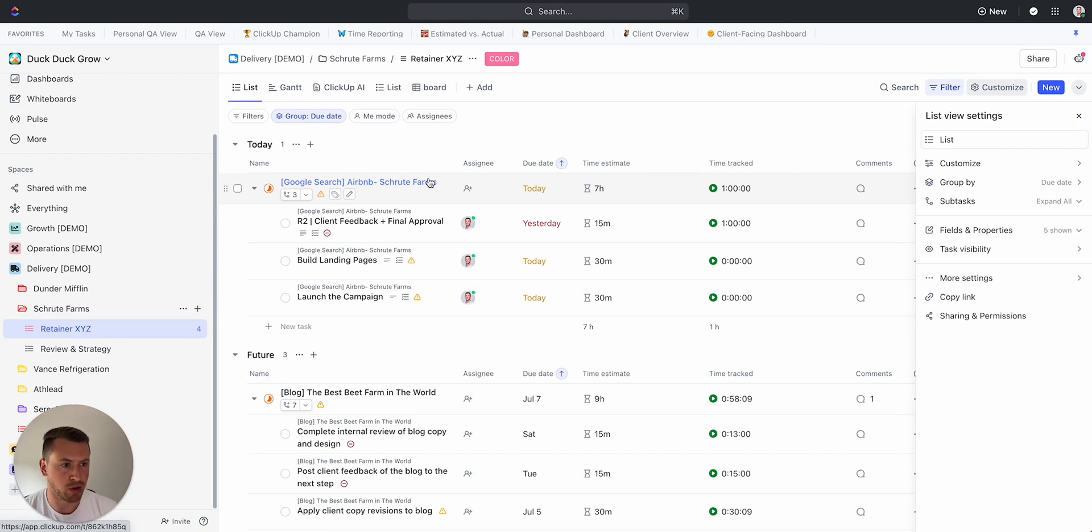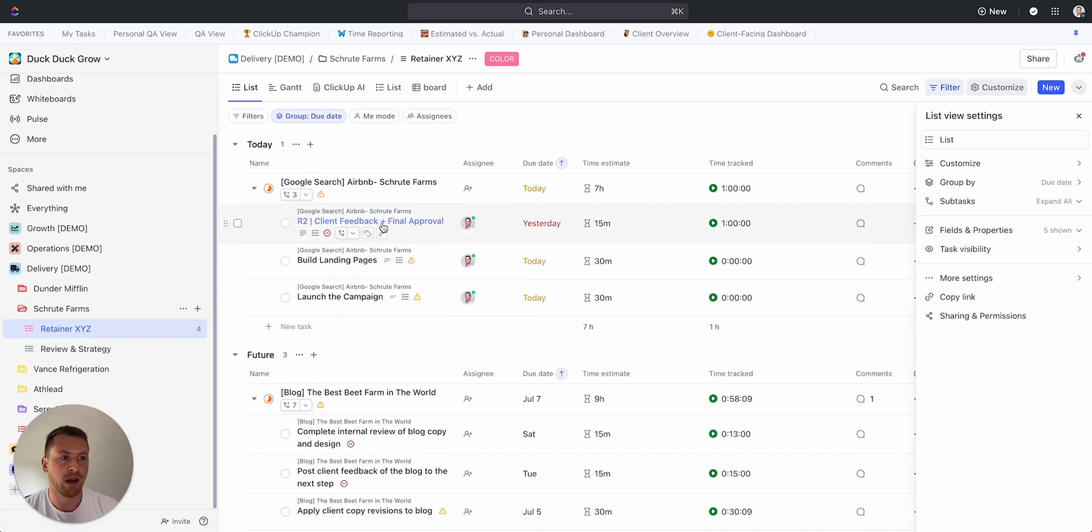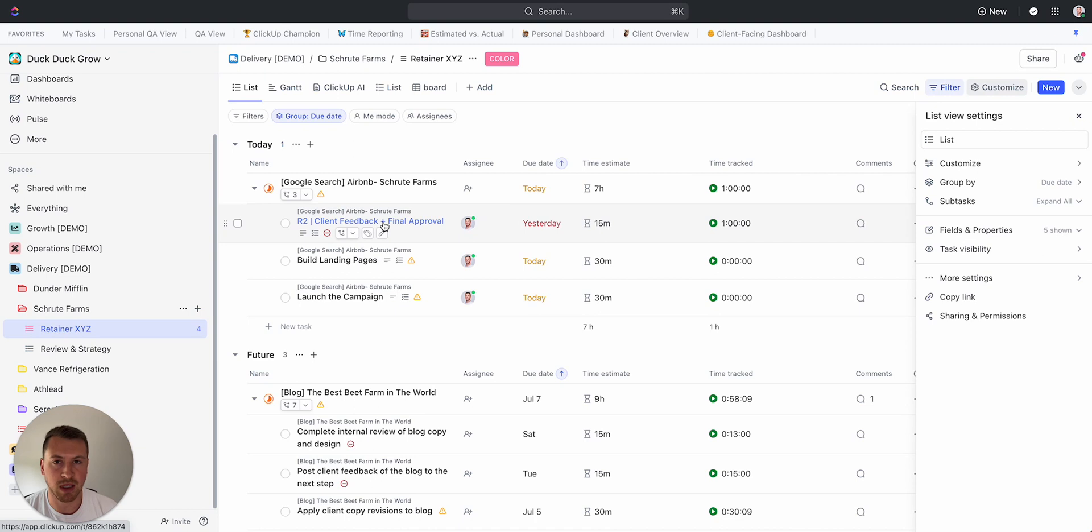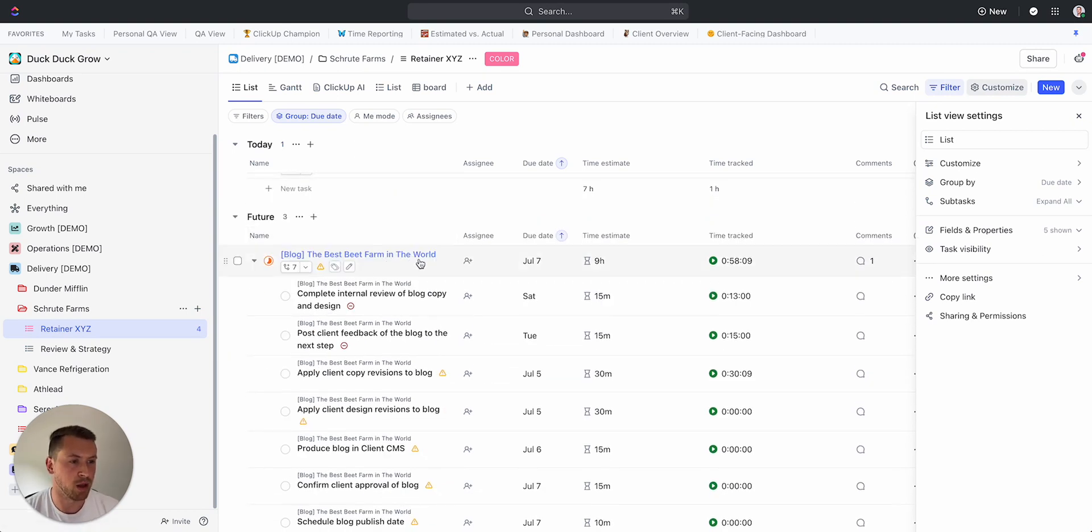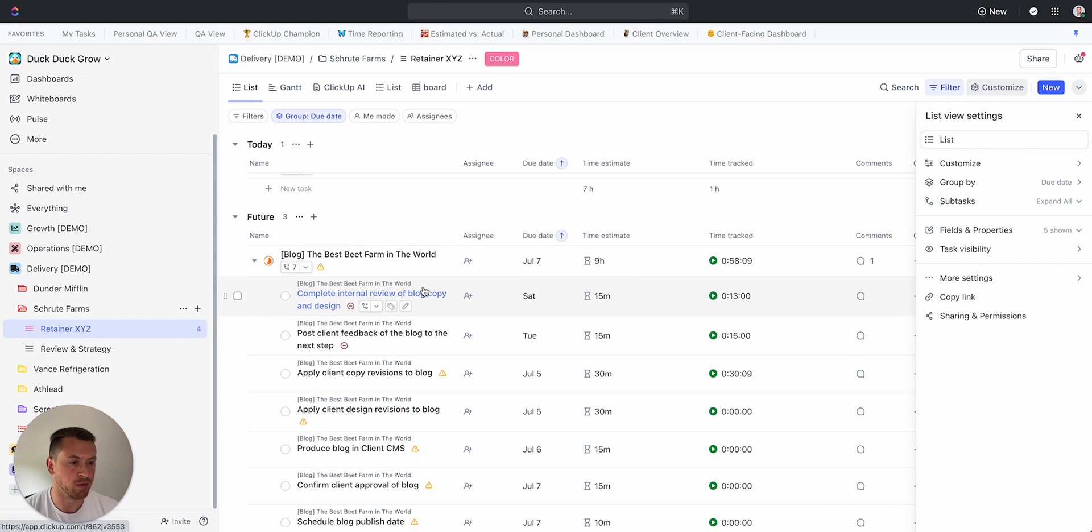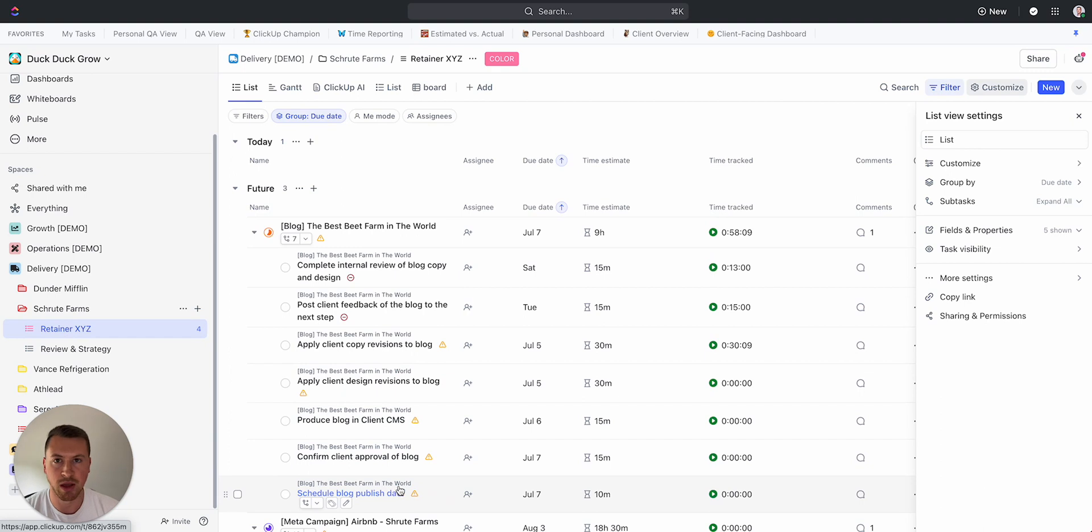As we can see here, if I have a Google search campaign, I'm going to have building the landing pages, actually launching the campaign, client feedback and approval, things like that—all the steps that you would take. There's already a bunch of completed steps on this. If I come down here to the blog post, you'll see completing internal review, we're actually going to write the post, produce it in the client CMS, confirm client approval, schedule the publish date—things like that.